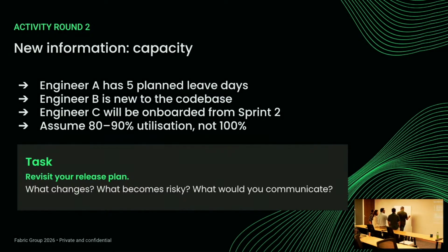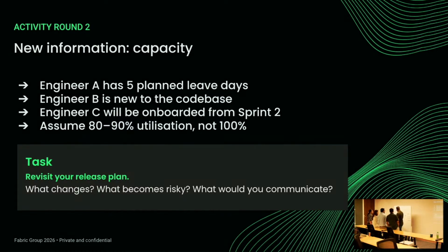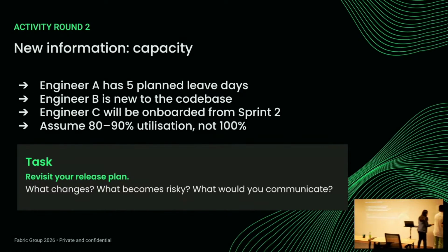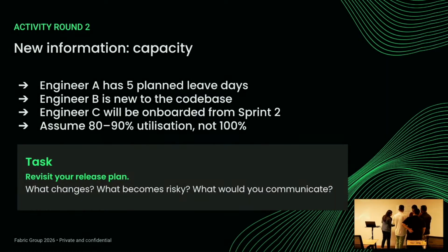Your other two developers are delivering 100%, but there's a utilization factor, right? So let's consider that there is 25 points worth of work that they can do, but multiply this by 0.8, because that's 80%. So let me calculate that for you. That's around 20 points. And then sprint 3 onwards is just going to be 30 times 0.8, which will be 24, 24, 24, 24. Let's assume.